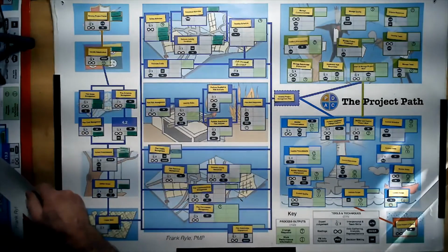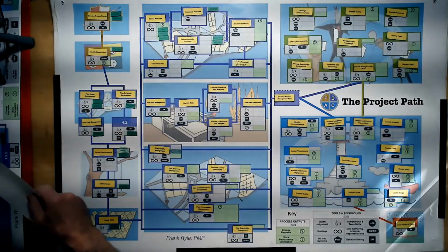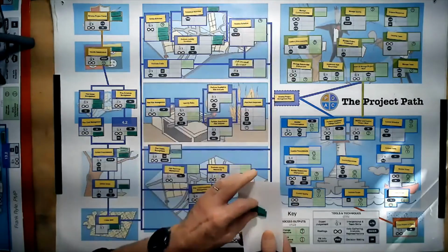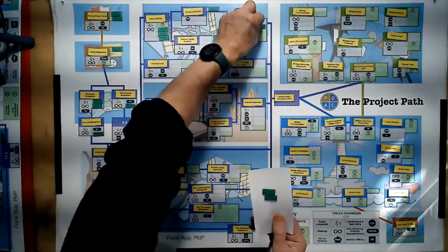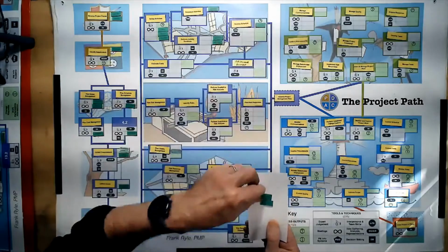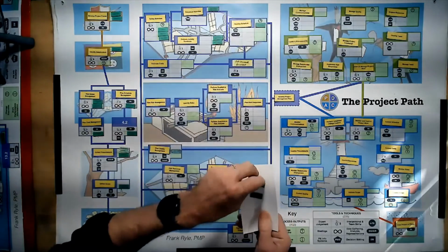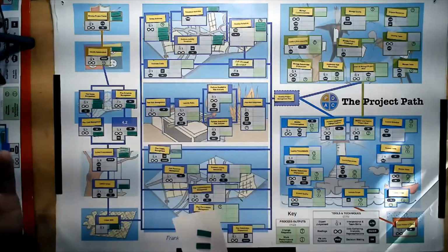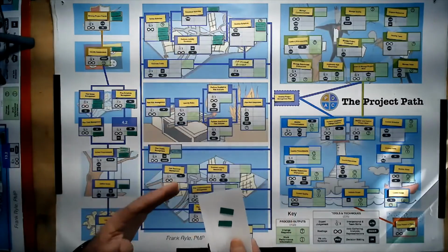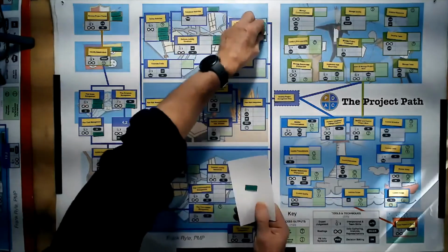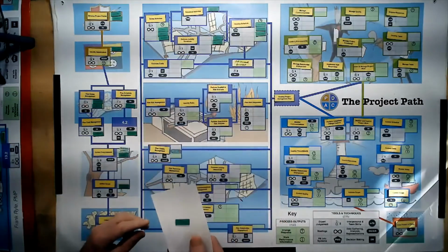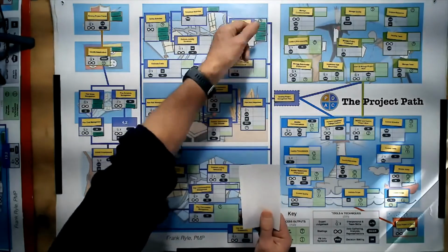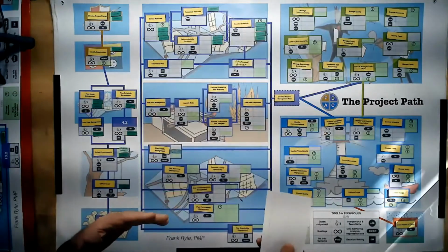Now we look at schedule. And developing the schedule, you can see, has quite a lot of outputs, again, the change requests that I mentioned. But now we have the project schedule itself and then the schedule baseline. So the idea that they're recognizing that you'll have a baseline and then you'll have the working version, and you compare the working version to the baseline, okay? We'll also have the project calendars, which are very helpful to us. And then we have the schedule data. The data is going to help us to build some models if we need to.